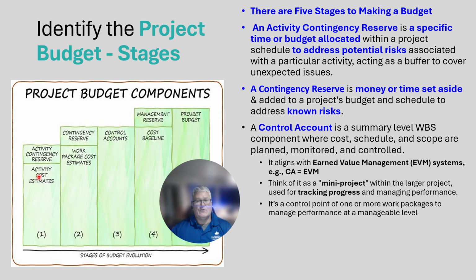And you might want to, in the project, go, okay, we're going to go with 10%. So if my first bathroom costs $1,000, and we go with 10%, I might have a contingency for that activity of $100. For the other bathroom, it might cost $4,000, and we will have contingency of 10%, and again, that would be $400. Now that would be really cheap, since I just did a bathroom myself. It was roughly about $10,000. 5 years ago we did a bathroom, it was about $5,000 to $6,000.